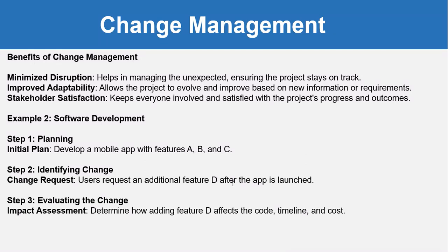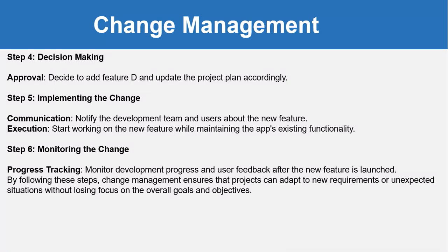so that is why we consider D a change request. Based on that, we determine how adding feature D affects the code, timeline and cost. So this is basically the assessment, and based on the assessment we will decide to add feature D and update the project plan accordingly.